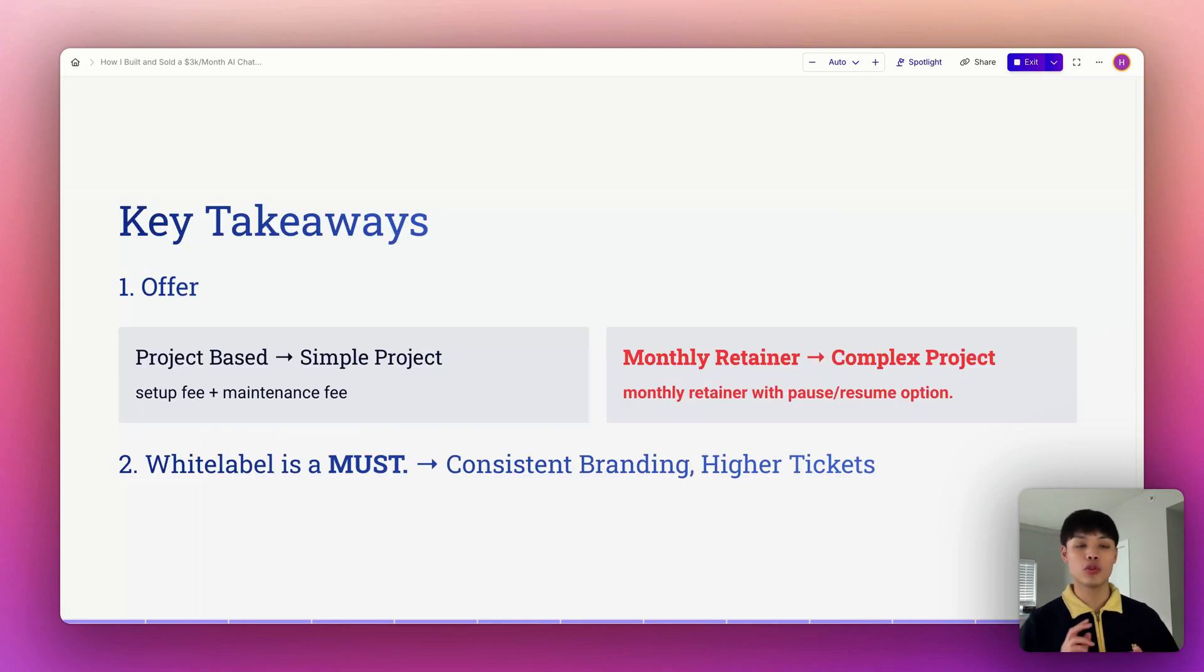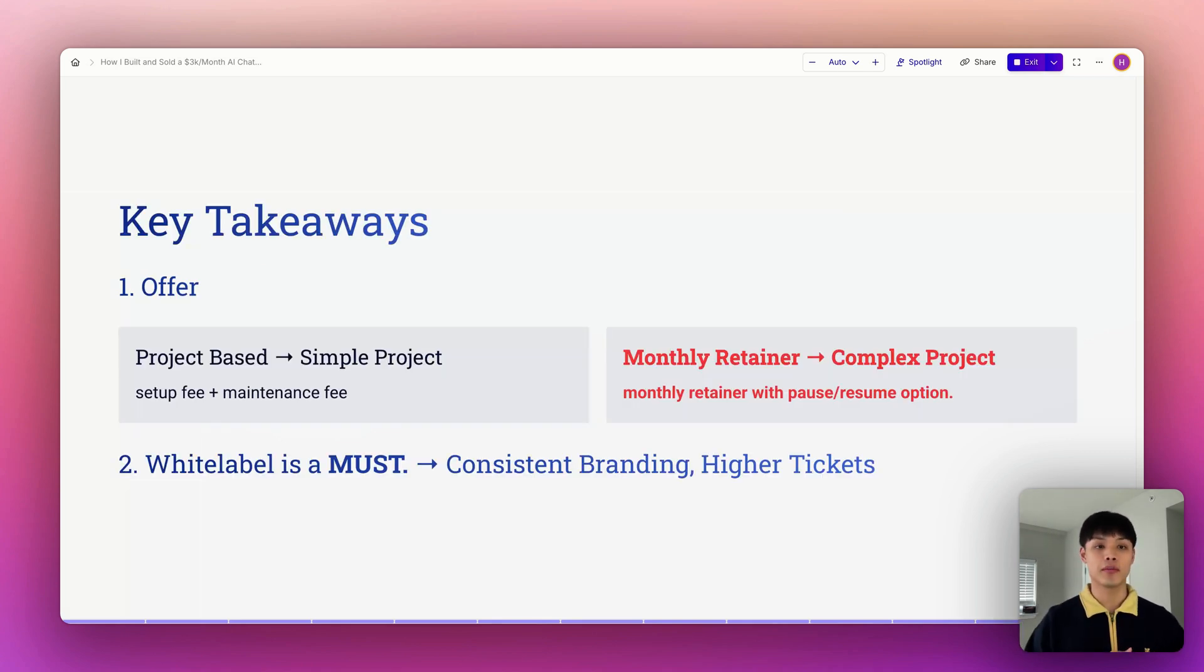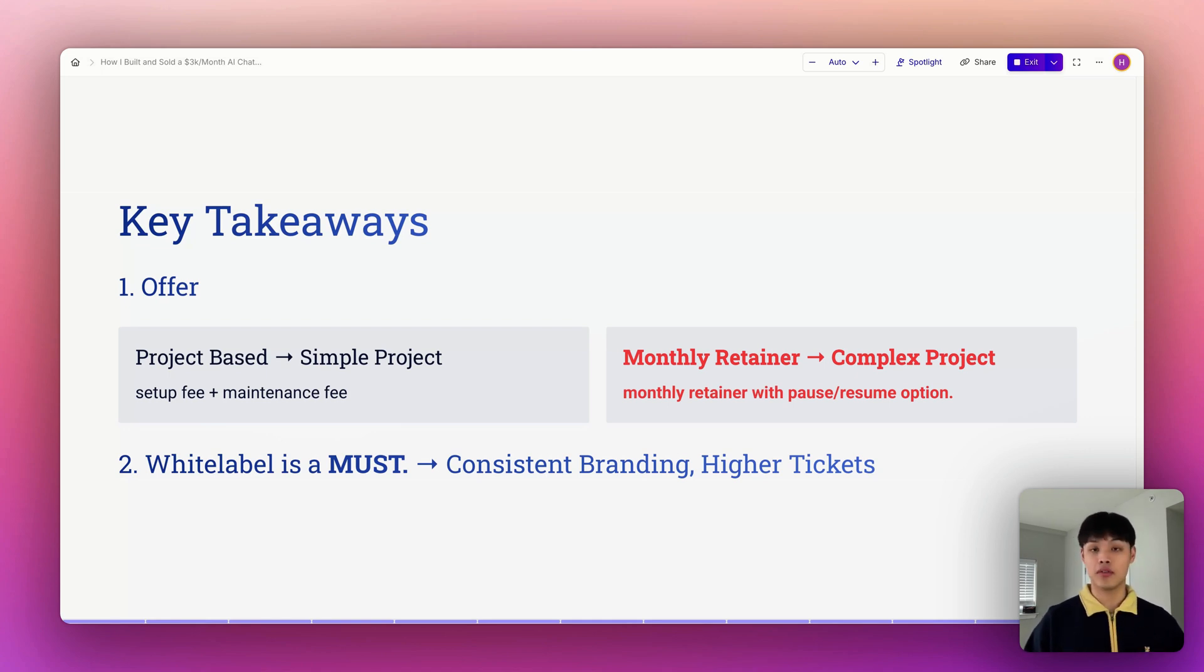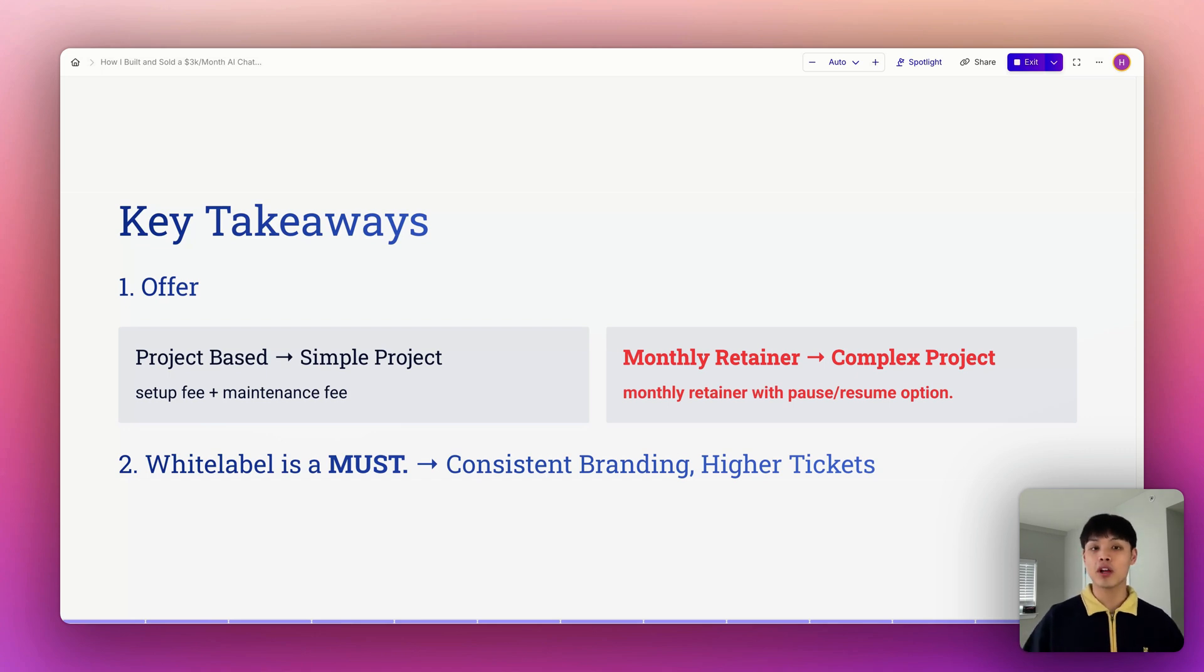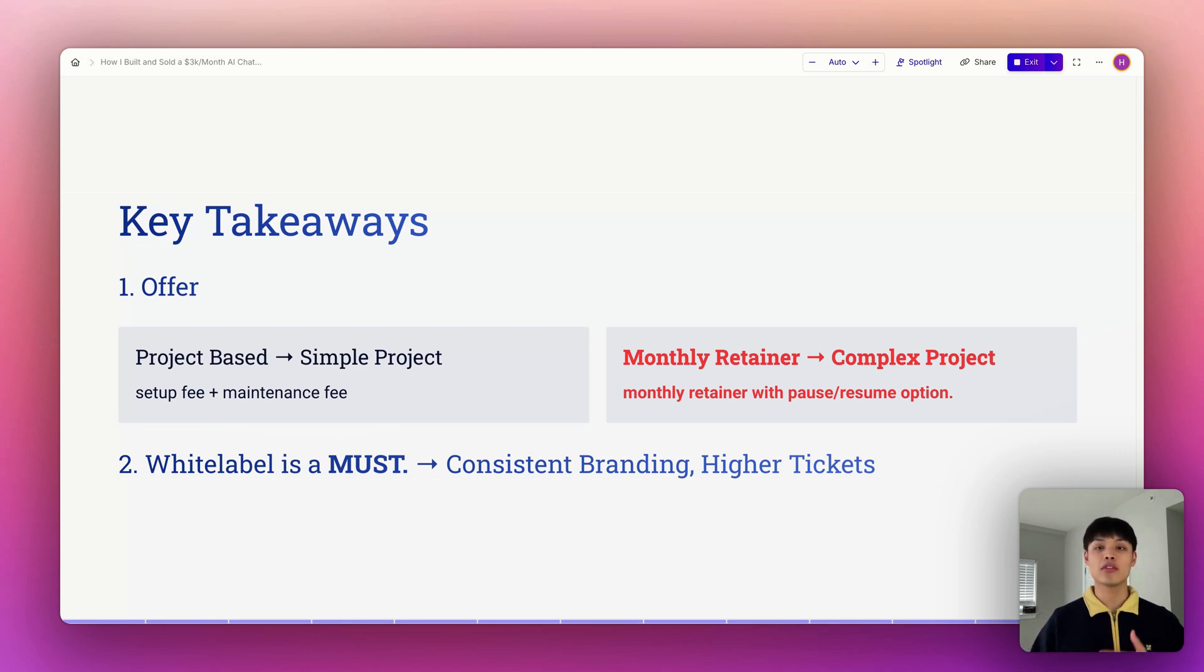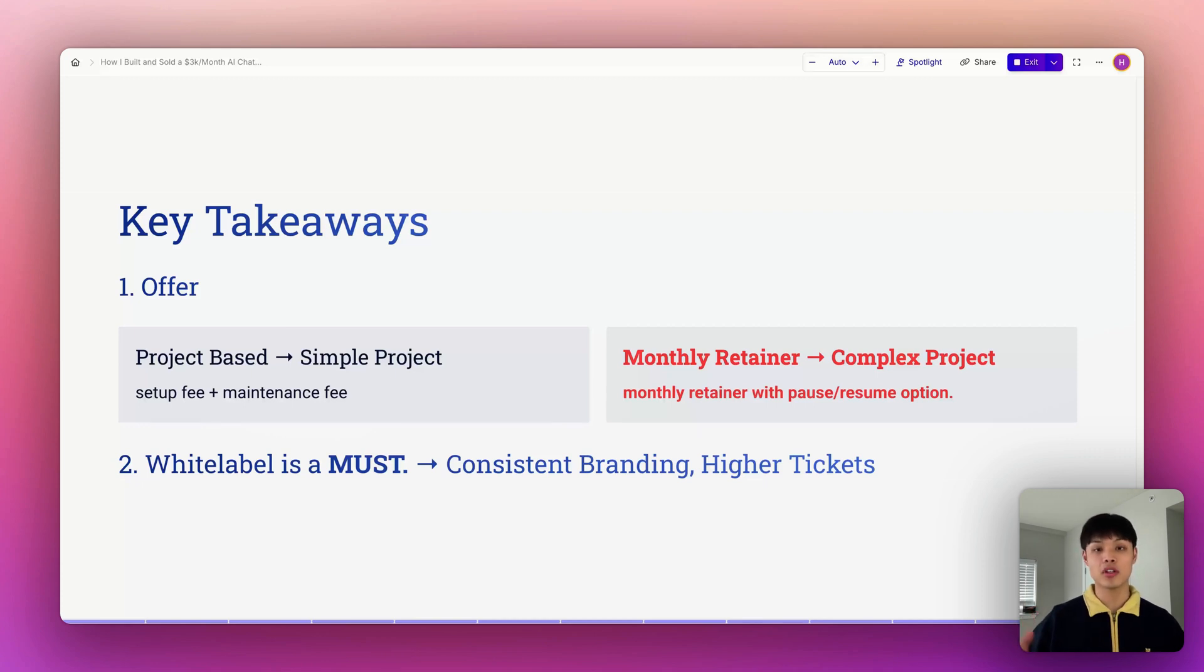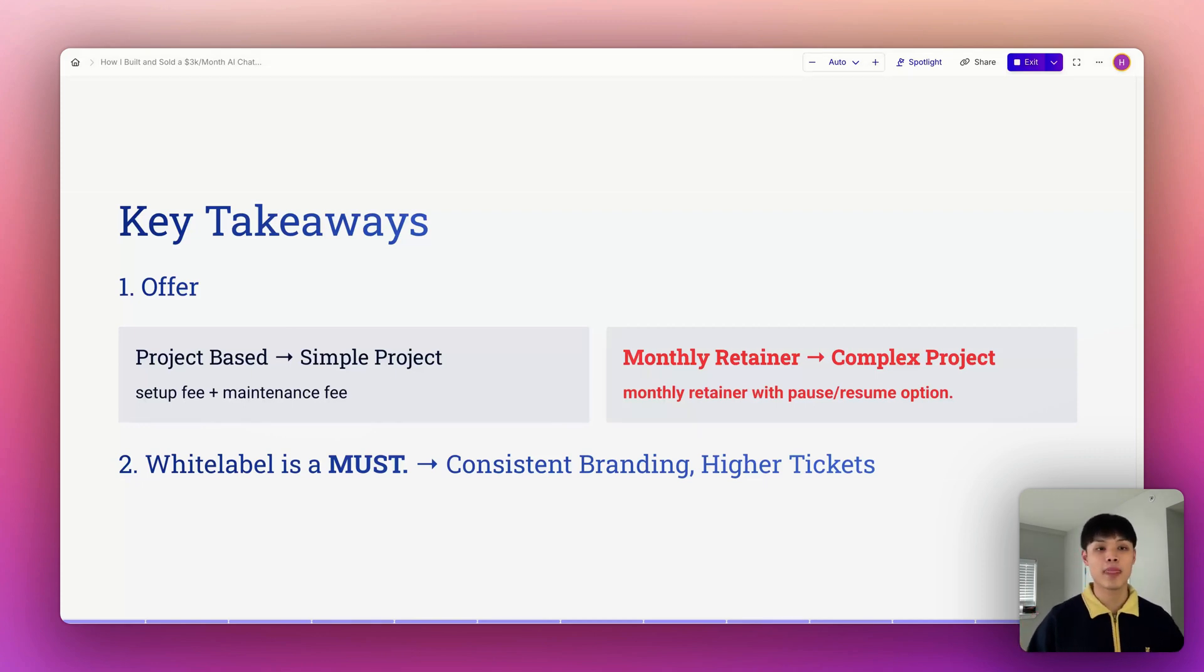Let's wrap up with two key takeaways. First, offer. For simple projects, a project-based model works well. You're charging your client a set fee and monthly retainer afterwards. But for complex ones, a monthly retainer is the way to go. It provides flexibility for evolving needs and ensures predictable revenue for your agency. Plus, I've included resources like agreement templates and a Notion Kanban board to help you get your retainer offer up and running quickly.